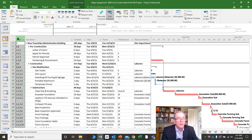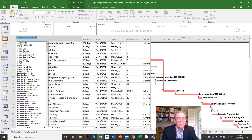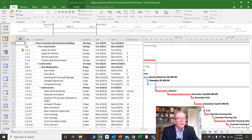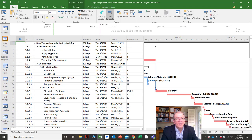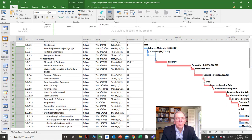The other column I don't have here but normally like to have is the indicator column. If you don't have it, right-click, go to 'insert column,' and press I for indicator. This is a very useful column — it will show if you've done anything peculiar to any activities, like added a custom calendar, a constraint, or a note.